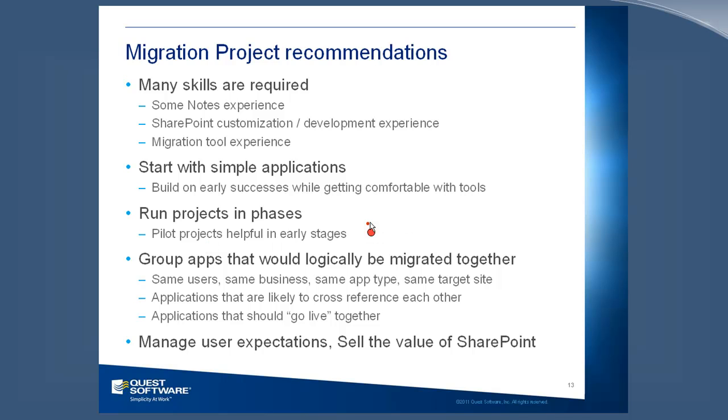But again, if your pilot phase is your first migration project, don't base everything on how long it took to do that pilot. Recognize that you were going through a learning curve there, and it's not going to be like that with your future projects necessarily. Also, we have a lot of things that slow projects down in the pilot phase, like getting the right access to things, getting the import service set up. Those take days too sometimes in the worst cases. So even though you're doing all your infrastructure setup in your pilot phase, don't let that confuse how long it's going to take to do things when you get going.